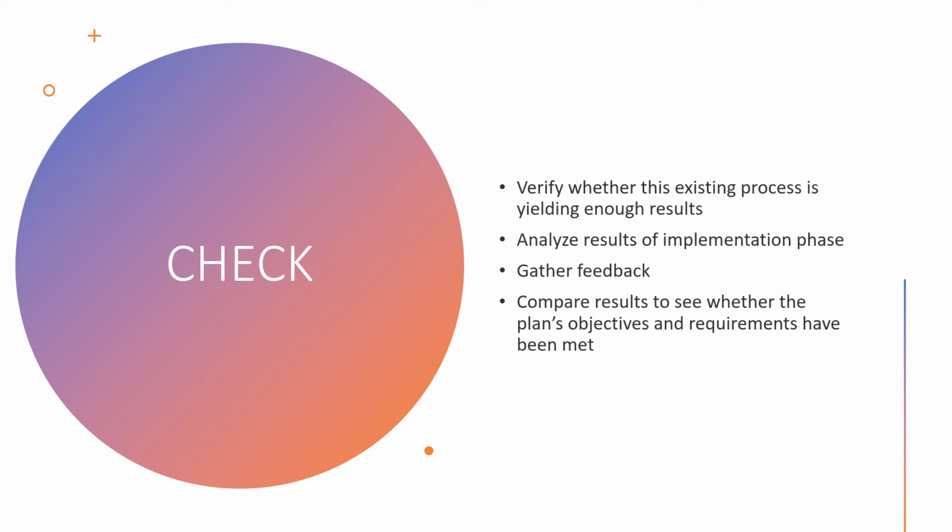So those results we need to analyze further, like how many days we have deviated. For example, what is the schedule variance, what is the effort variance, what is the productivity, what is the utilization of your team. So all these things we need to verify here.